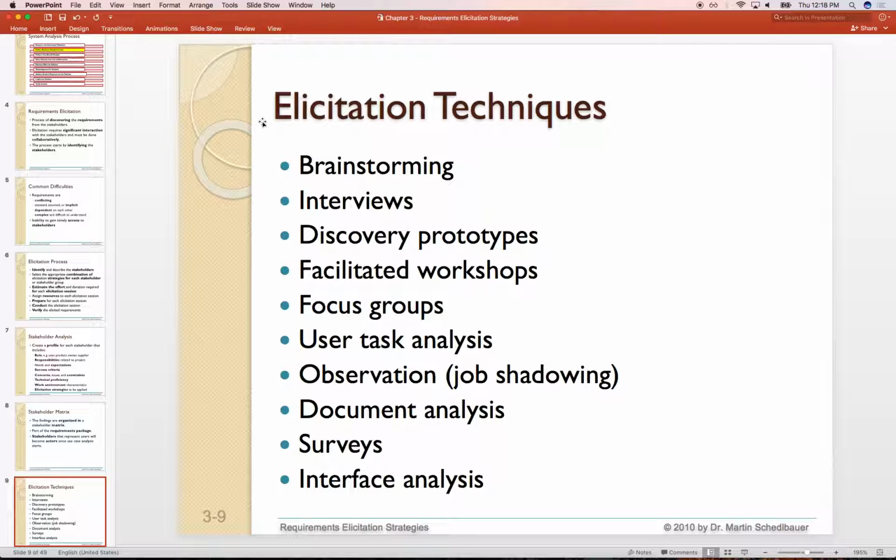Certainly creating different prototypes, where folks that might be very apt at building rapid prototypes, right? As people are meeting, they can create multiple prototypes for folks to actually visualize it in their minds, right? They can actually use it and try to break it and say, okay, well, yes, I think this is what I told you to do, but now that I see it, I don't like it, right? So it's a cheap way of quickly eliminating dead ends, so that we shouldn't go that route, right? But not until you see an actual prototype do you actually know these things.